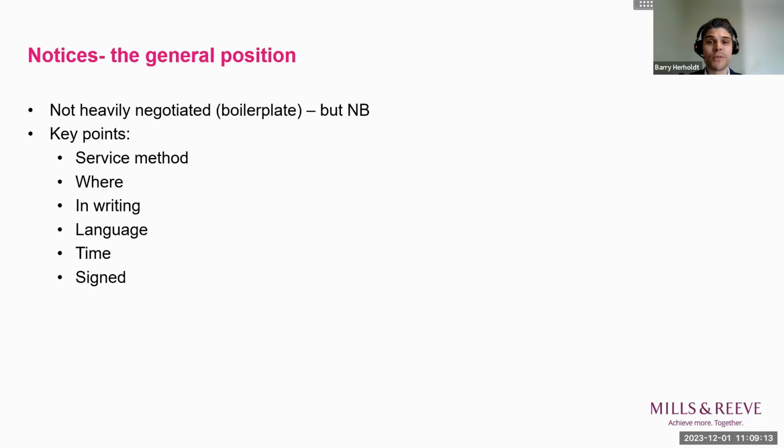The last point to consider is, should the notice be signed? Look if it's a requirement for the notice to be signed by or on behalf of the party that's giving the notice. An electronic signature will generally be valid if it's intended to authenticate the document, i.e., typing a signatory's name or initials into an email can be sufficient to be a signature.